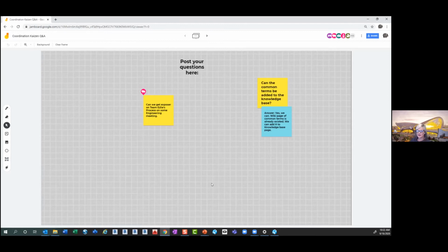One of the other things we talked about that's a factor is getting die approval. Die approval, at a minimum, comes from the Jumpstart team, and as everybody knows, that can take up to 6 weeks. So if we're trying to move things through the process, and Esley's supposed to have stuff done, and we don't even have all the dies approved, which would be her wish, I believe. Esley, correct me if I'm wrong. How is that even feasible in our timeline? Where do we move things way back? How do we manage even that technically?